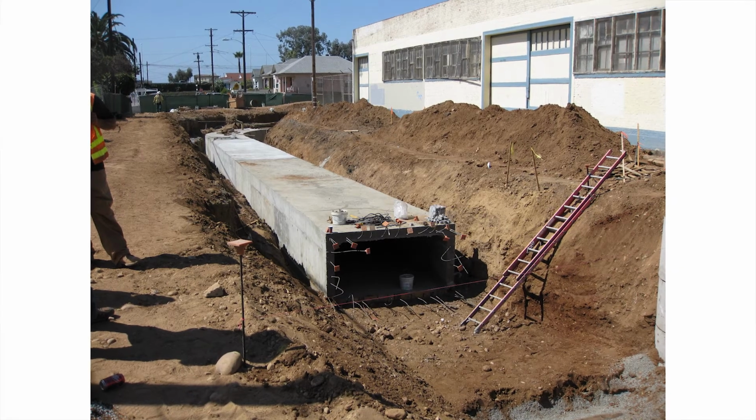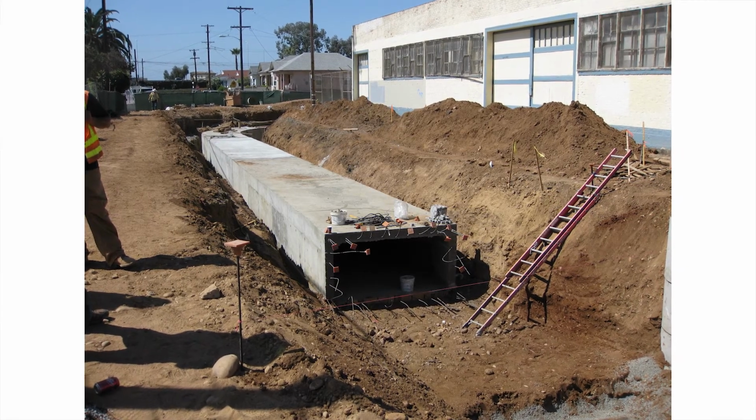inevitably has many challenges. My name is Chuck Prytel. I'm a project manager with SCS Engineers, and I was the project manager for the first about three-quarters of the COM22 project. The site was first developed before the turn of the century, actually as a residential site, and it was filled in because there was a drainage way through the middle of the property, which created some challenges because the soil that it was filled in with actually contained burn ash, which has metals in it, including lead.